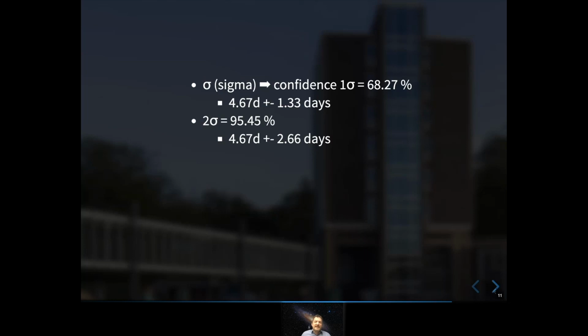And now, yes, the range gets broader. This is pretty logical. If you think of the mathematical distribution curve, it gets broader, but we get more confident, of course. And this is actually the trade-off we have to take. If you want to be more precise in your estimations, the range gets broader.